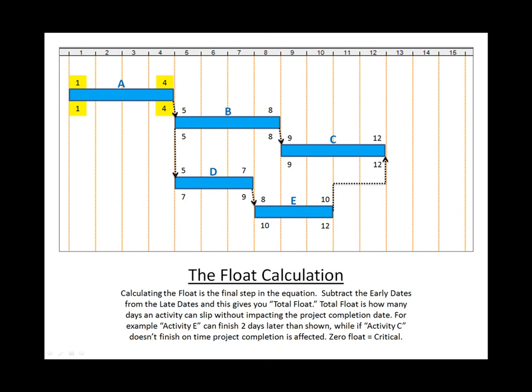If on A we subtract the early from the late, we get zero. Same thing with activity B, and same thing with activity C.